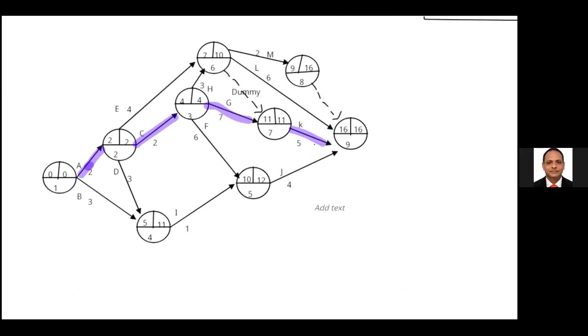Yes, you can write down, right? And what does the question ask? Yes, it's months, right? The question asks, can activities B and D be delayed without affecting the project completion time? How are you going to answer? Just check B and D, critical or non-critical. Based on that, you say the correct answer. B is non-critical. D is also non-critical.